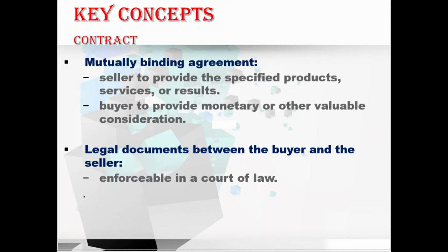All contract-related communication should be formally written, and all the product and project management requirements must be stated. A formal change has to be initiated for all work that is not stated, and all changes to the contract must be agreed and signed by all the parties.